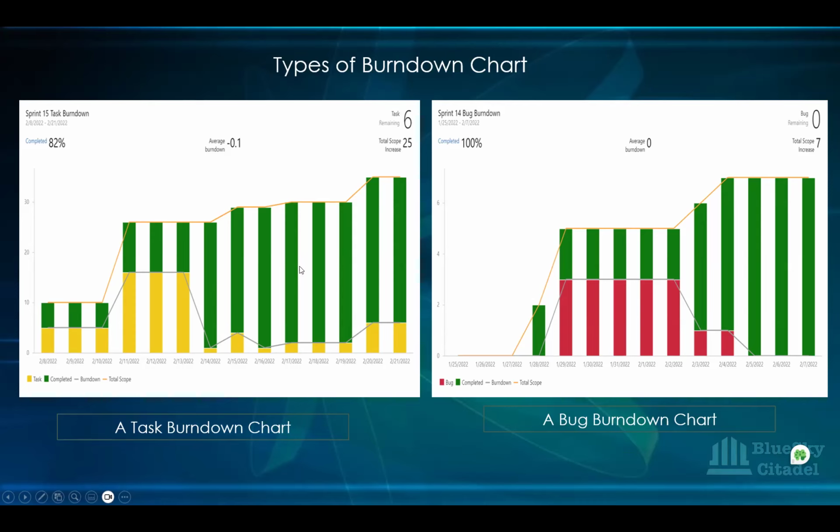The gap opened up a bit here, where they were able to complete a lot of things, but unfortunately not able to complete everything at the end of the sprint. And you'll be surprised again, like I said, they might have completed everything, just that people didn't close their task when they're supposed to. And those are the kind of things you want to check during stand up, or even before or even after stand up, reaching out to the right person to say, oh, I noticed that the story is still there.